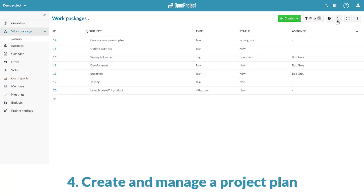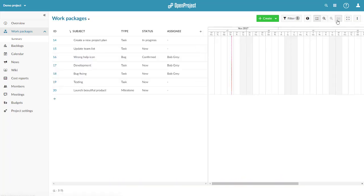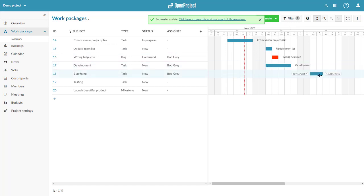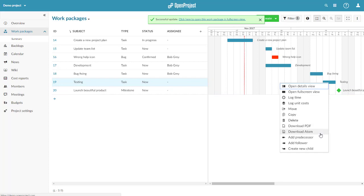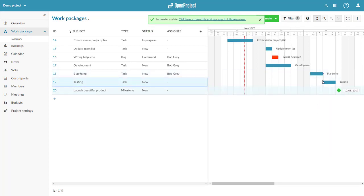Fourth step is to create a project plan. Clicking on the little icon will activate the Gantt chart view for your list. Create phases and milestones directly in the Gantt chart and update it with drag and drop. Add dependencies with right-click and choose predecessor or follower.